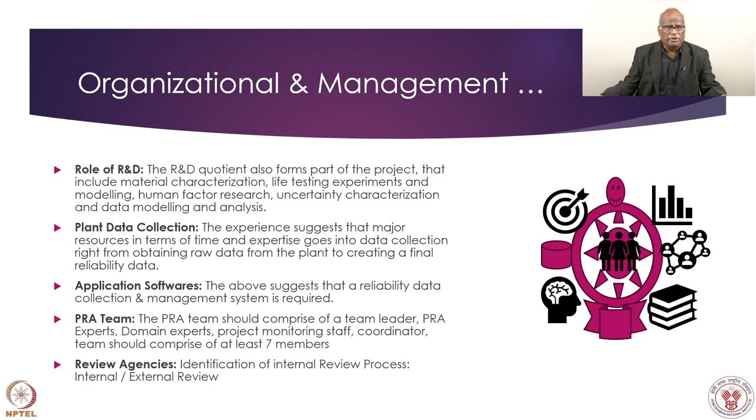And the second thing is, there are some special aspects in PRA. A good amount of R&D is required, or even developmental work, because some components will have to be tested. So if it is made a priori into our project report that so many components require so many test facilities, the efforts can start, and as the project goes on, whatever R&D or testing is required, prior provision should be made through the project report or management approach.